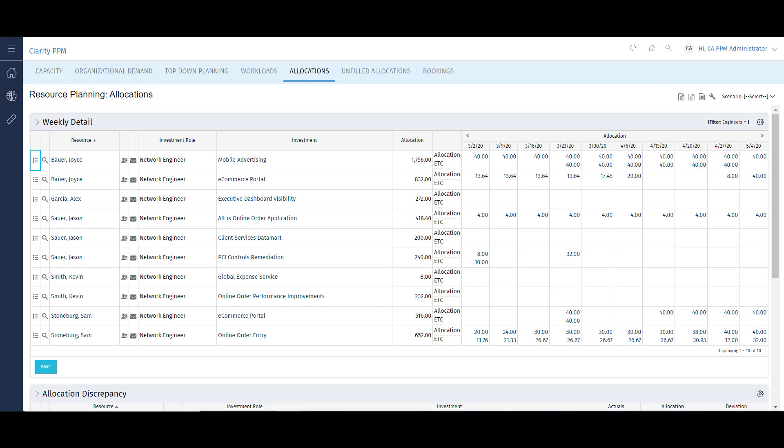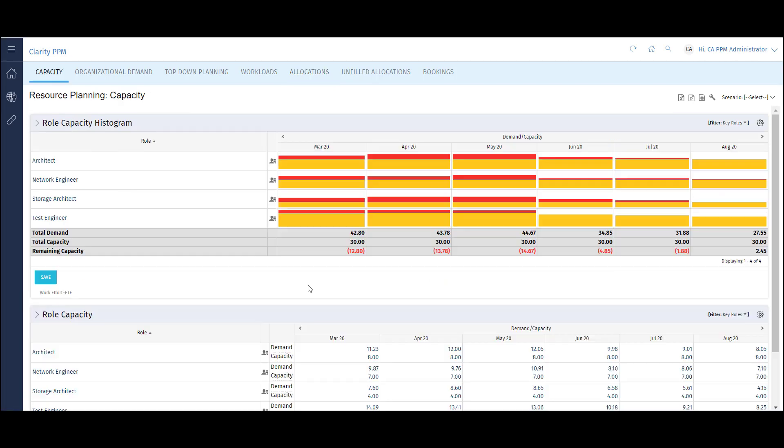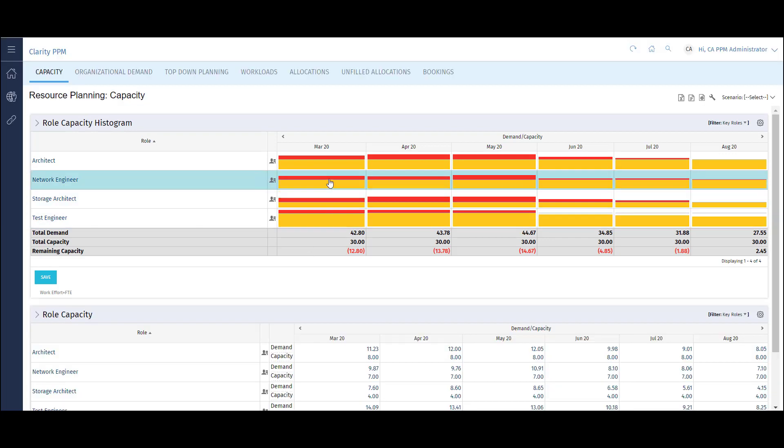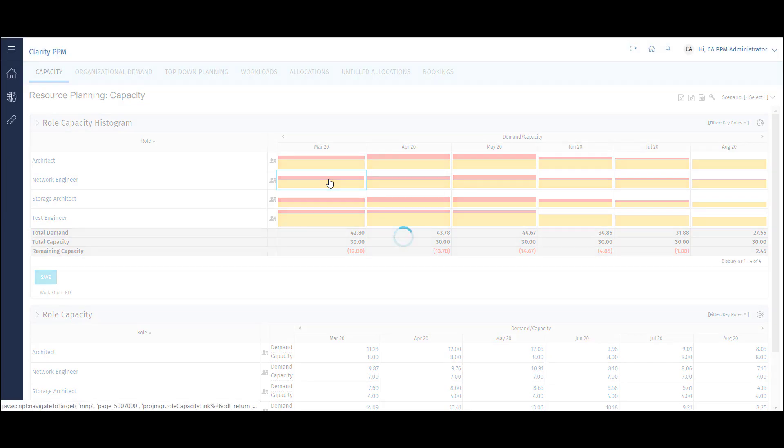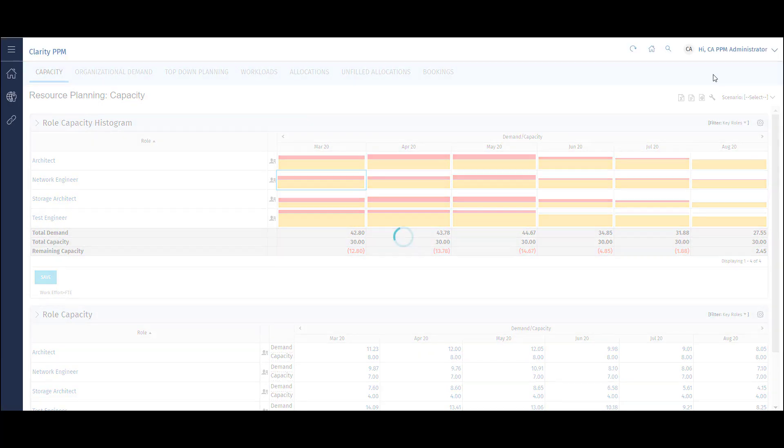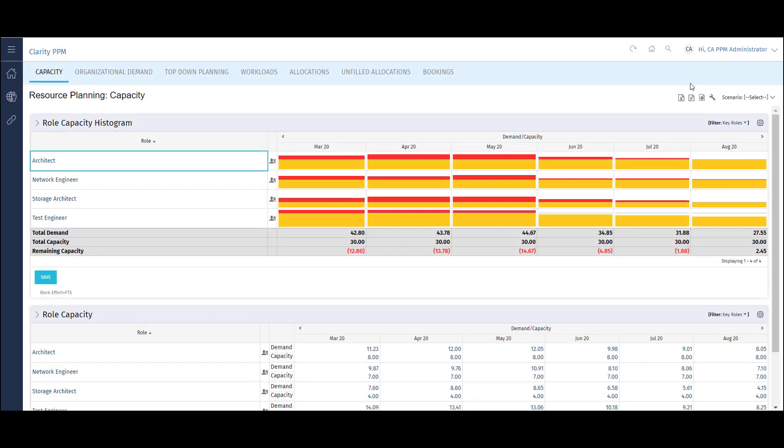The next view displays resource capacity versus demand at the role level. Here I have a histogram view that easily identifies some of the bottlenecks in my organization. These roles all have demand exceeding capacity and will have an impact on many projects. I can drill into the histogram to see exactly what projects are utilizing these roles and use these as constraints in my portfolio planning views. These are just a few of the many dashboards resource managers can utilize to effectively manage their people.